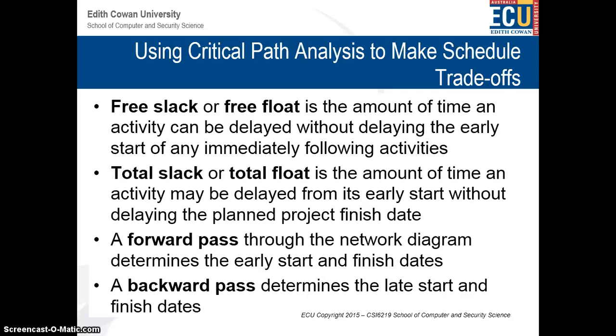Different things, same wordings: free slack, total slack. Let's see what they mean. Free slack means you delay, but the next activity's early time won't be affected. Total slack means you delay the activity, however the ending date is still valid.